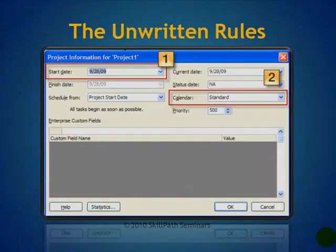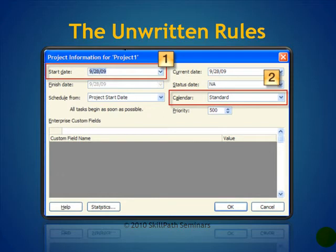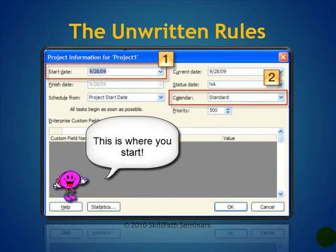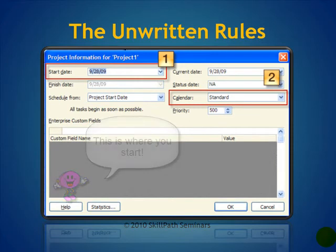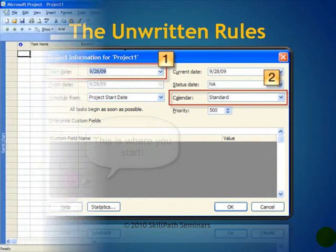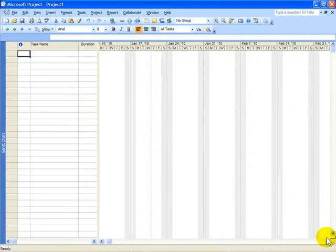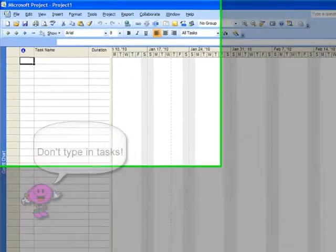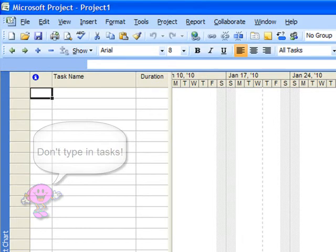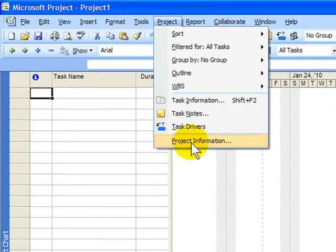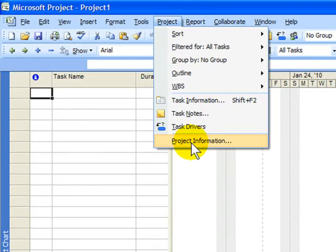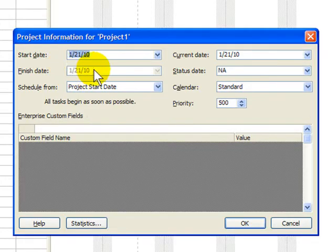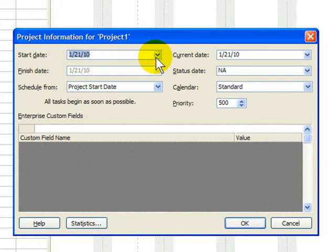You see, first you set up your project start date, then you choose a calendar, and then you begin making your project. Let me show you. I'm on a blank project screen, and the first thing I'm doing is not typing in a list of tasks. The first thing I'm doing is going to the Project menu and choosing Project Information. When I do that, I can select the start date for the project.